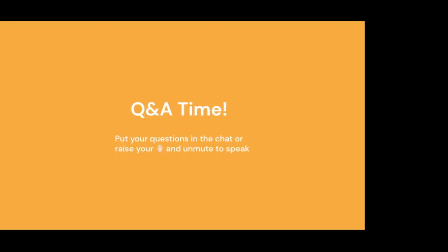Oftentimes having a project manager role helps. If there are 4 of you in a group, one person can double as a project manager and help figure out the tasks and the timeline. That would make it easier. And then you want to do a drop dead timeline, right? So maybe you want to do a check-in say 2-3 hours before. You might want to do some check-ins every now and then if you're working in a team setting. But as you get closer, for that last 2-3 hours, that rush time, you might want to